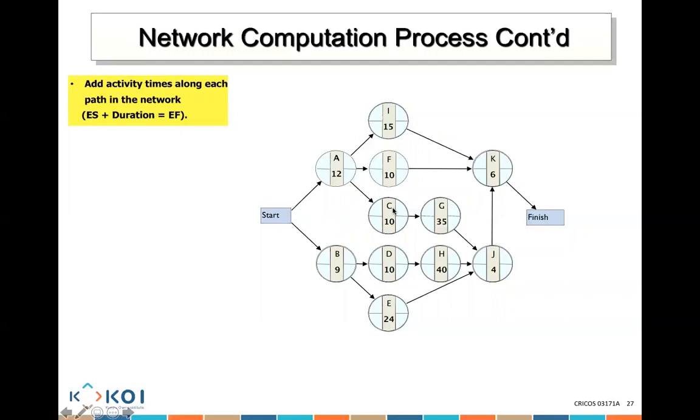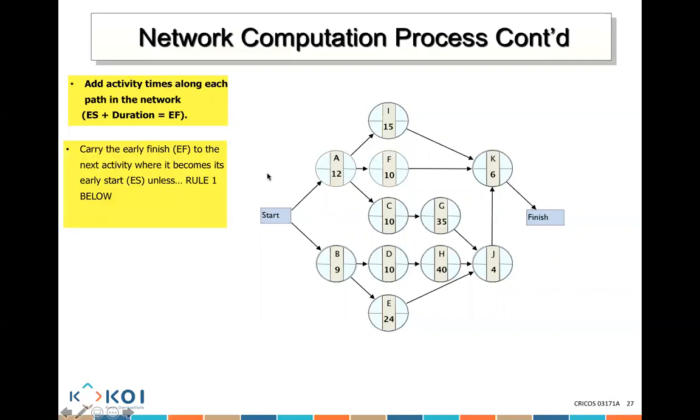So that's basically what we're talking about in that particular example. The early finish time from one activity becomes the early start time of the activity straight after it. So if you look at this second item that I'm showing you here, carry the early finish time from the first one, on the left, to the next activity, where it becomes the early start time for the next activity. This basically is what we need to bear in mind, with one exception.